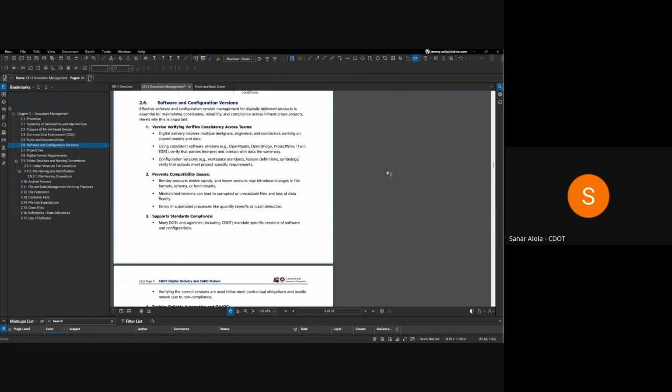Yeah, Jen, I want to add one thing. We have had a Mojo ticket that resulted from a project team working on a project but working with mixed versions of Open Roads Designer. This is also something we want to avoid. When the project is ready and created project-wise and is using ORD 10.12, the consultant needs to know the version we're using because it works with a workspace, and we also don't want 10.11 and 10.10 and 10.12 all in use.